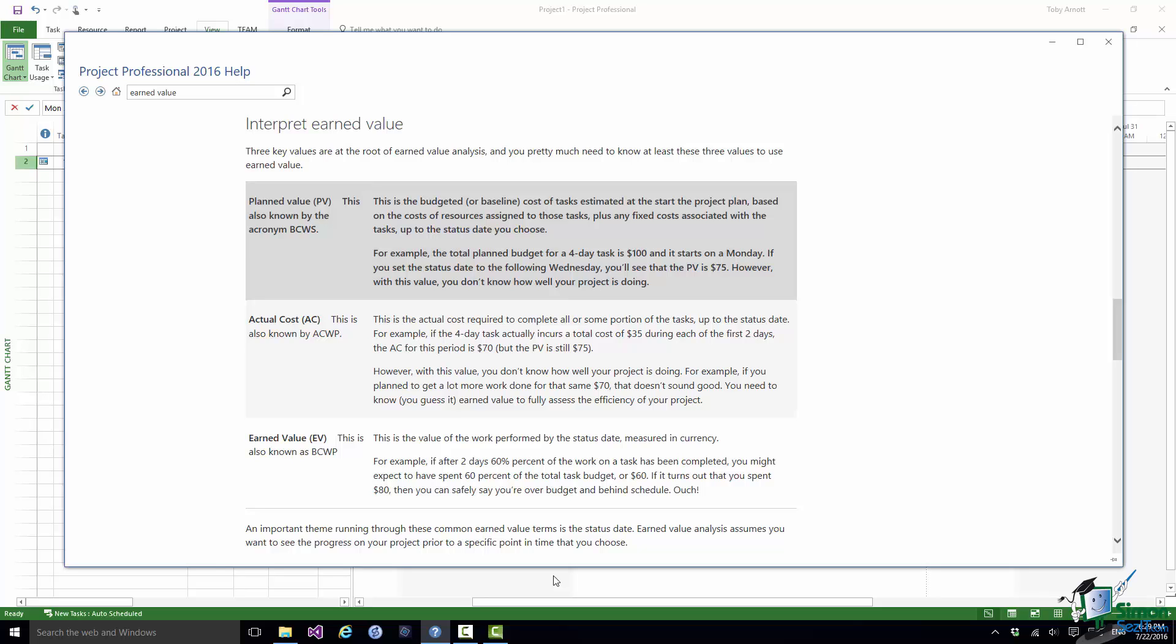And the third term is EV, Earned Value. And the alternative here is BCWP. And this is what is the budgeted cost of the work performed? So the difference between the first one and the third one which are both budgeted costs is the first one says what was the budgeted cost of the work we were scheduled to perform? And the third one, BCWP, what was the budgeted cost of the work we've actually performed? And the middle one is the actual cost of the work we've actually performed.